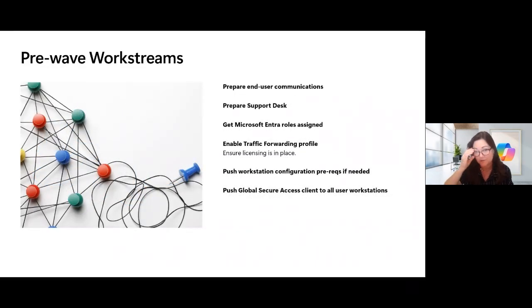So the pre-wave work streams are the tasks that you need to complete one time and then maybe fine-tune based on your experience or user feedback. This includes things like preparing all of your end user communications. This includes defining the schedule for notifying support, when you're going to notify end users and stakeholders of each wave so that you can set their expectations and everyone knows exactly what's going to happen and what they need to